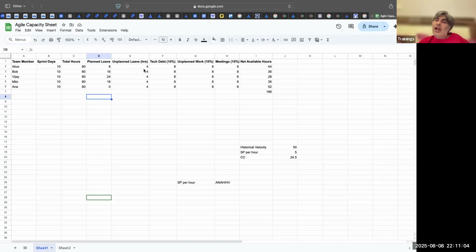days of unplanned leave, because an emergency can come, a taxi strike is there, your children can be late to school, whatever, anything can happen. Let us say 4 hours. So 4 hours is 0.5 days. So I've taken just 0.5 days as standard.